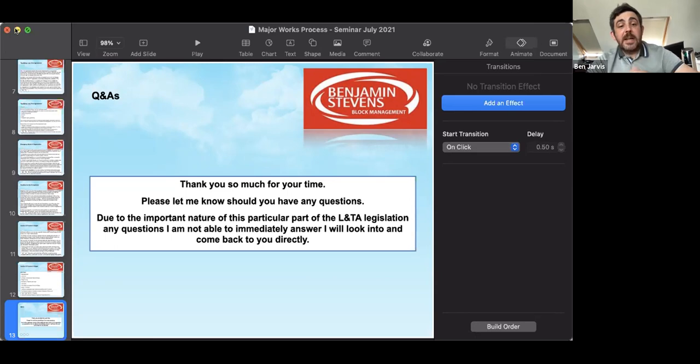If need be, I can get some further information to people who want to cover that base, but within our standard template to send the emails and letters out to the contractors for estimates, we do specifically cover that part to make sure that they are aware, as they should be as a good contractor doing major projects, of those particular CDM regulations, and that if the works are likely to encroach, they give us full details and factor those costs in accordingly.